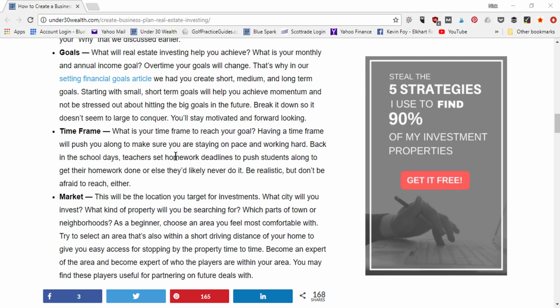An example, recently with our apartment building, we set the carpet guys to come in after about 6 weeks of owning the building. That gave us 6 weeks to hurry up, get in there, bust our butts, getting the place ready and renovated so that we could have all the painting done, all the drywall work, all the sanding, all the messy stuff done, so that when those guys get in there, they could put down the fresh new carpet and we don't have to worry about getting stains and messing up the nice new carpet. So it gave us a good time frame and deadline to push us into gear to get a lot of work done quickly so that we'd be ready for those carpet guys to come in.